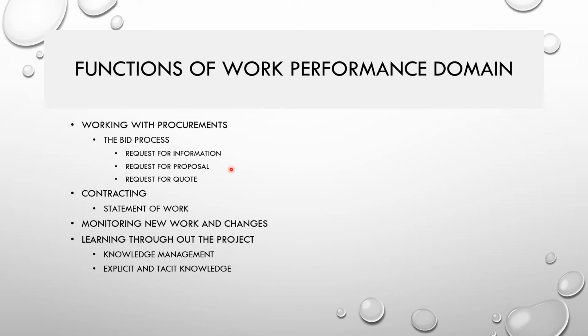So the statement of work will talk about the scope of the project and who are the initial high-level people involved in the process and the project, or it might talk about high-level planning. What are the performance requirements that are needed? All those regulatory standards, terms and conditions will be part of the statement of work, right? And the statement of work becomes the project vision statement, or a baseline document against which you'll start measuring the progress of each constraint, like budget or schedule, or whatever it is, right?